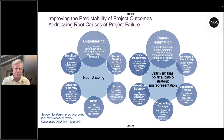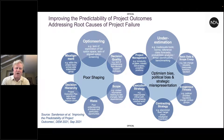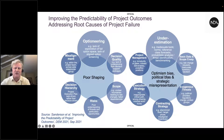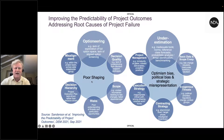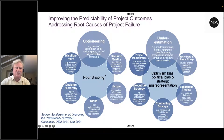Let's start with what failure looks like. This graphic is based on my personal experience, extracted from a paper we jointly wrote with Orano, our French sister company, when we were looking at project failure. On the right-hand side there's a hypothesis that optimism bias in cost, schedule, and scope estimation is a problem. We're deploying tools in the NDA to address optimism bias. What we have not been doing so much is addressing the other side of the root cause of failure, which is poor shaping. Framing is aimed as a holistic tool to address most, if not all, of the risks of project failure if done well.